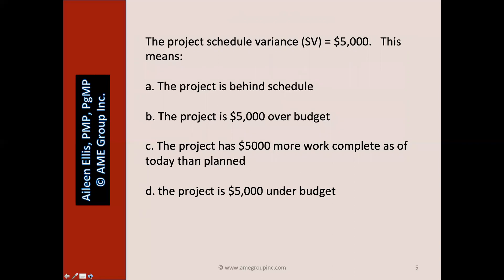The schedule variance is a positive number — that's a good thing. Answer A, 'the project is behind schedule,' is wrong; if the project were behind schedule, the schedule variance would be a negative number. Answer B, 'the project is $5,000 over budget,' is about cost, not schedule, so B is wrong. Answer C, 'the project has $5,000 more work complete as of today than planned,' is the best answer. Answer D, 'the project is $5,000 under budget,' is wrong — the question only tells us about schedule variance, not cost variance.